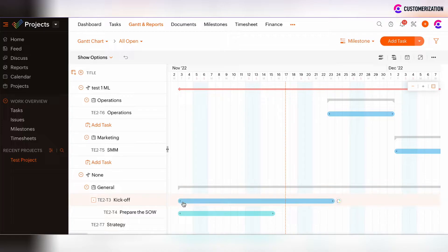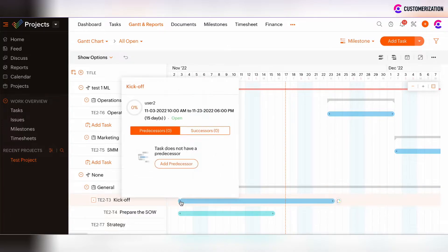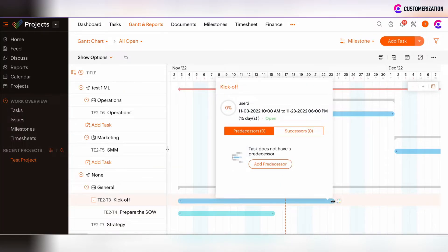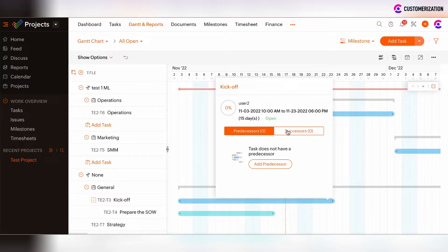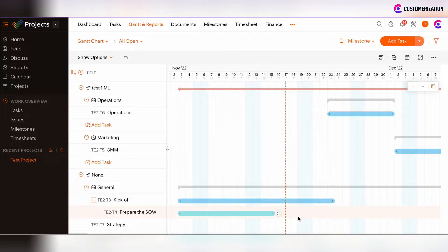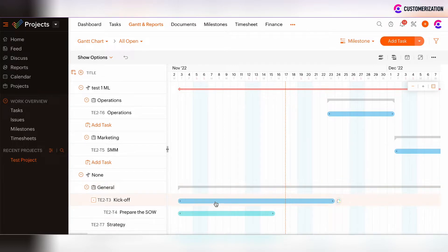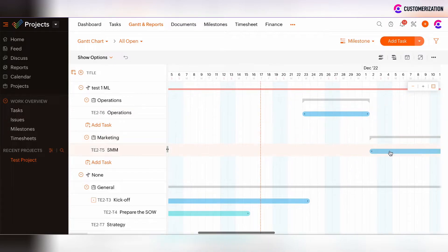By clicking on some arrow at the beginning of the task or at the end of the task, we will see the setup window with two options to set the predecessor or successor of the task. In such case, let's define the logic of some tasks order. We have the kickoff task, then operations task, and SMM task.